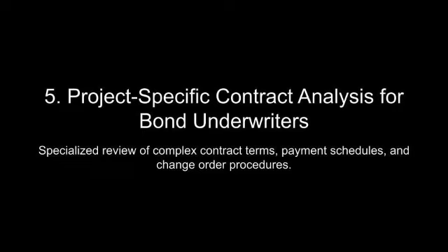This involves scrutinizing policy exclusions, coverage limits, and endorsement requirements to ensure there are no gaps that could create undue exposure for the surety. Another area of concern is the interaction between contractual insurance requirements and the terms of the bond. For instance, payment bonds often guarantee that subcontractors and suppliers will be paid for their work, but disputes can arise if insurance claims are also filed for damages related to non-payment or contract breaches.